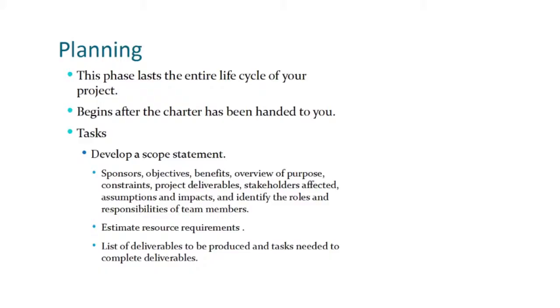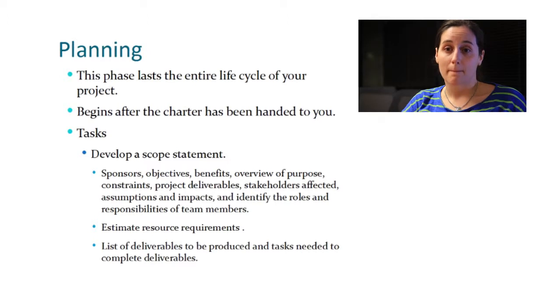After the charter has been handed to you, your first task is to develop the scope statement. In your scope statement, you should include the following details: sponsors, objectives, benefits, overview of purpose, constraints, project deliverables, stakeholders affected, assumptions and impacts, and identify the roles and responsibilities of each team member.